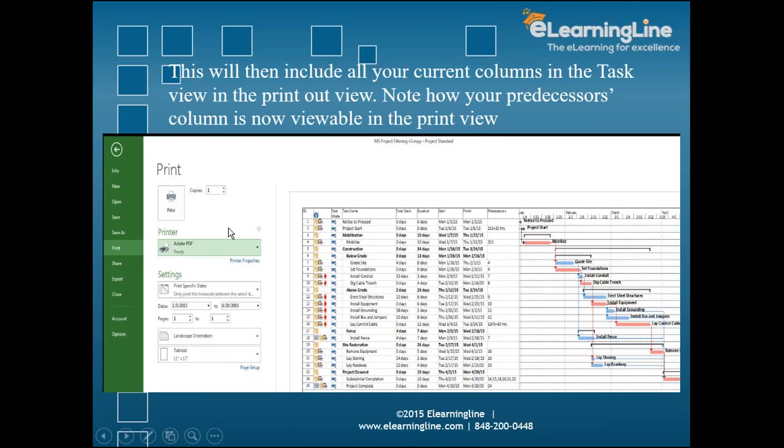And also, not only that, you see here the specific dates. Since you selected this option from the previous scales, it will only print the time scale between the selected dates. So that means you have defined the date: this is the date I want to see. Page 1 to 1, just one page. Because when you are taking the selected date, you do not want to have 10 different pages printed. You just want to make sure that if your data relies on only the first page, you print only one page. And that is your print setup.